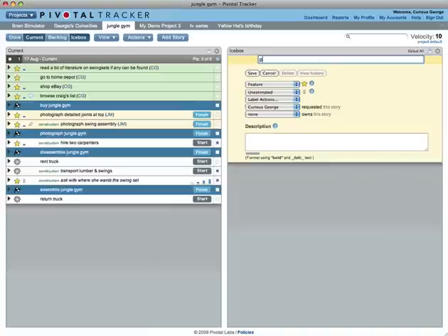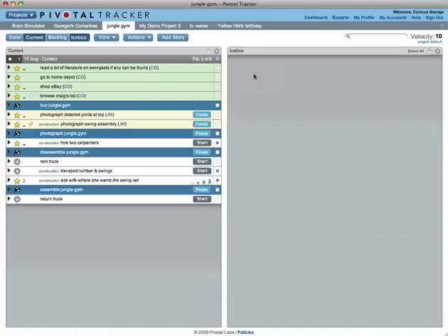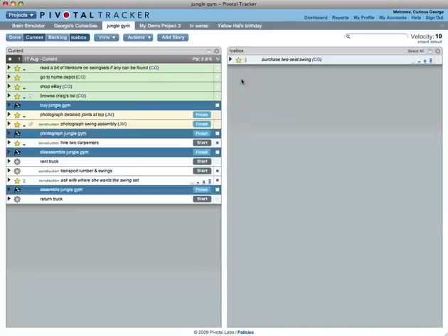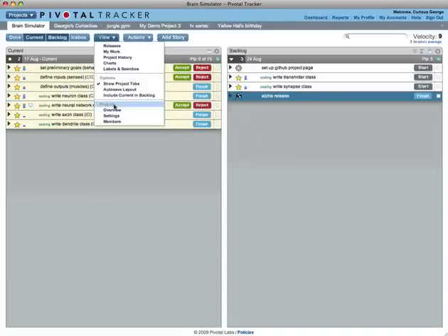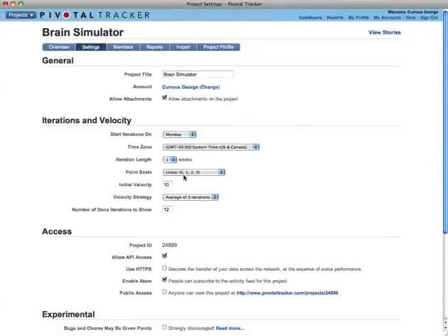If you enter a story that you heard from someone else, you might set them as the requester. You can also set an owner if you know who will be responsible for completing it. Otherwise, whoever starts the story will become its owner. To assign more than 3 points to some stories, change your points scale.